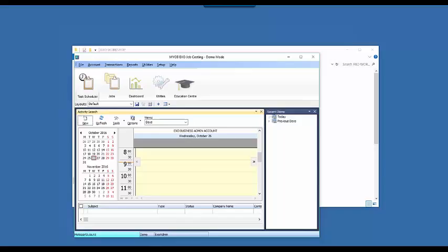A job will capture and accumulate the actual costs and sale values. Serialized stock can be used. Fantastic if you work with big things that you have to track long term for your clients. And jobs allow flexible invoicing, so you can invoice time and materials, so do the job, invoice it out, per a quote, via a billing schedule, so if you've got staged invoicing that you do, or via asset creation. Billing schedules allow for progress claims and pro forma invoices.